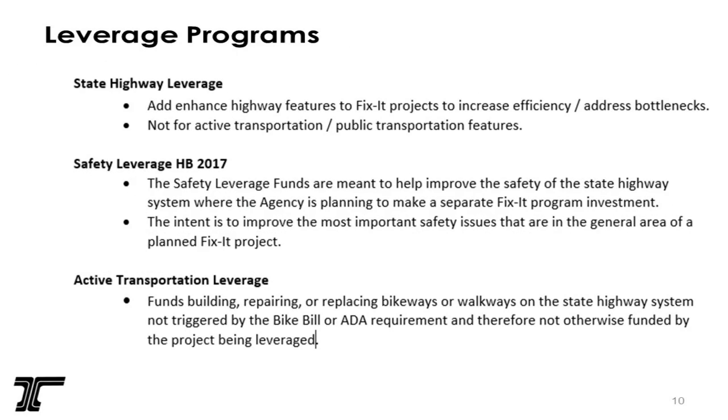Another one, the OTC gave us a pot of money called leverage. One of the tough things that you may have experienced is you're delivering a project, you're working on your charter, and someone says, oh, could you also do some sidewalk infill? And you're thinking, sure, give me the money to do it. No money forthcoming. So this time the OTC created 3 pots of money for active transportation, safety, and highway operations, so that when we want to add scope to a project, there is money to come with it. So that's the second topic.